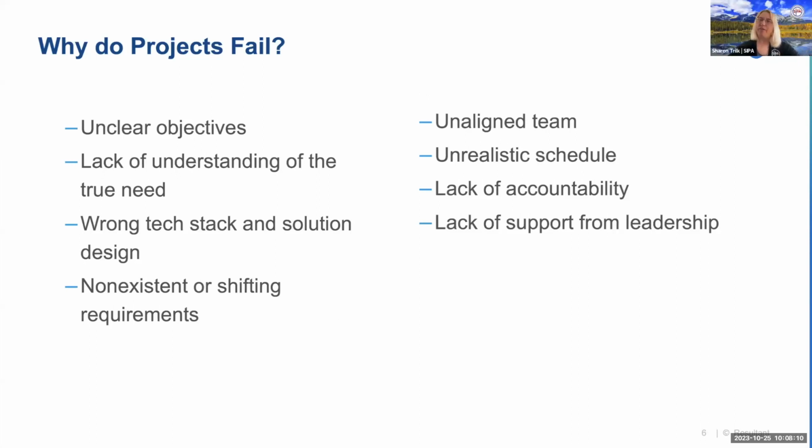And Anderson, we had a question in the chat on failures. Do you have numbers on lack of adoption to the change? I don't have the specific breakdown for that. That certainly is a big one that we've seen, though, is just solutions that are implemented but that aren't adopted. And that's something that we've actually been pushing quite a bit over the last couple of years at Resultant with our projects: putting together a change management plan, and actually standing up a team focused on that, because that was something that we really saw quite often, again, especially with data projects, where the team may come up with a really sophisticated solution, but if it's not actually adopted by the end users, if they don't see the value in it, if they don't know how to use it, then that really can limit the actual benefit of the solution. So that's definitely a big component of project failure. But I don't have the specific breakdown there.